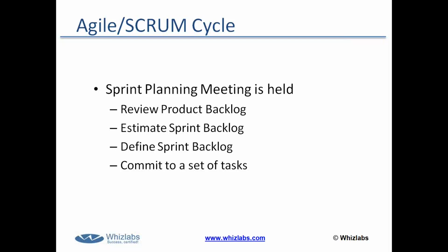Right? Okay, so after the product owner puts this product backlog together, which could be a list of 100 or a few hundred user stories, right? And where he has them prioritized, at the top of the list should be the focus of the first few sprints. At the bottom of the list are the wishes or the added features that they may want down the line, like a year from now or 3 months from now, in subsequent input from the market. The client may change their needs. So this is like a wish list of something that they may want as a feature in the application.